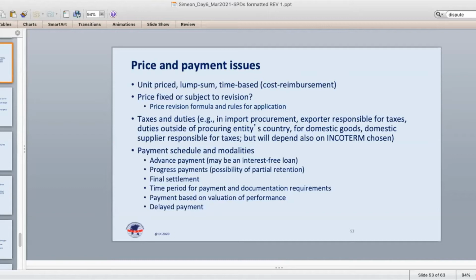But when it comes to this 30% contribution, if it covers compensation, and compensation comes up before actual implementation, you realize a lot of loopholes in compensation, a lot of failure, for instance, in negotiation with the landowners, cases dragging on for so long, going to court.